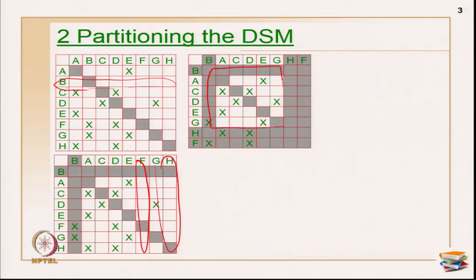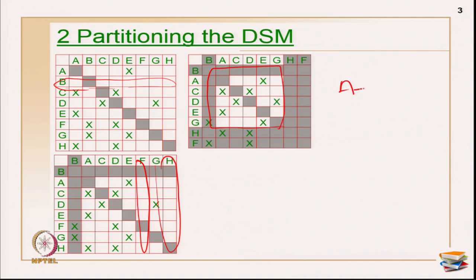Now, how do we identify the loops here? There are many methods for doing it, and I will show you one method. Primarily the block is very simple, so I am going to show it manually. Otherwise, you can also use the power of the adjacency matrix in Excel sheets and you can still get the result. I am going to show it manually only. So, primarily A to C, then A to E, then C to D, then D to C, then E to A, and then G to D.